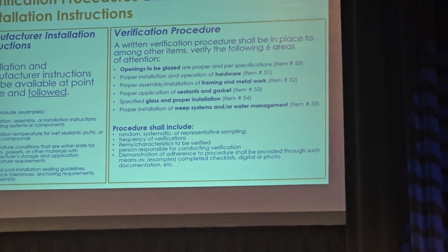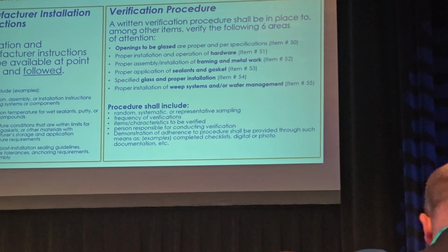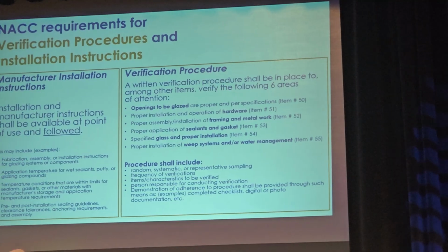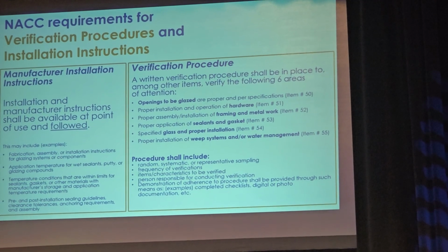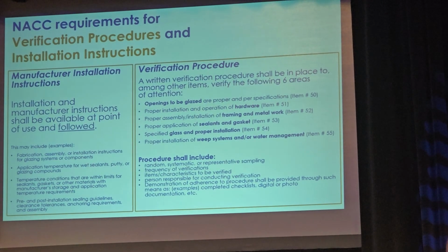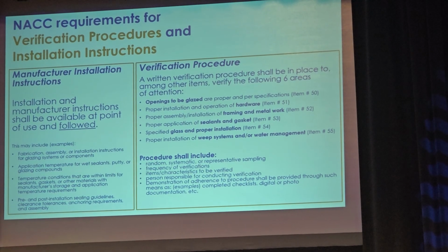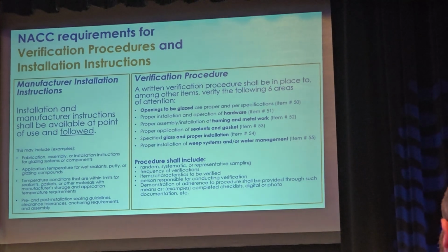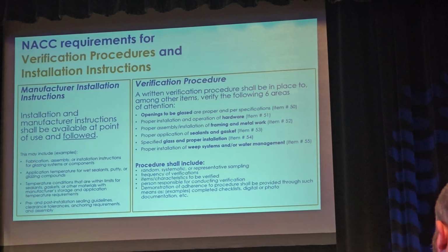Have the mock-up. Use that as the template to correctly sequence your construction. Then the contractor should develop a series of instructions for the guys so that they know the right sequence to follow as they build things. Any examples, Doug, from your experience in using installation instructions?